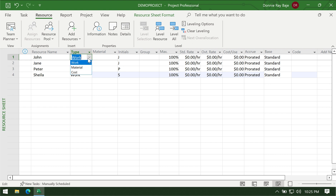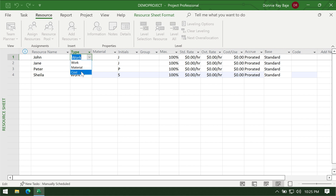There are three types of resources in MS Project. The work resource pertains to people; materials pertain to your items and supplies; and cost pertains to other costs that are not work or not items.